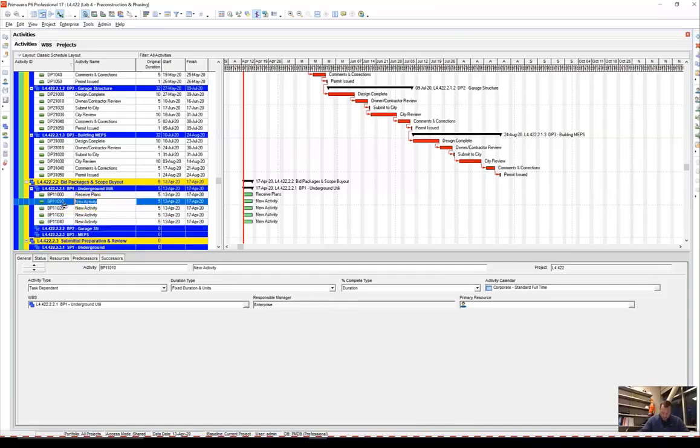So the subcontractor has received the plans. Next step is they submit the pricing to the general contractor. You do a little bid review and whatnot. This kind of includes negotiation, but we're going to finalize subcontract. So there's a lot of back and forth in this subcontract. And once the subcontractor's picked, hopefully, we're going to submit to owner for really the final sign off. Once this owner's approved, we've got issue subcontract.